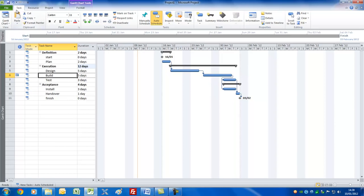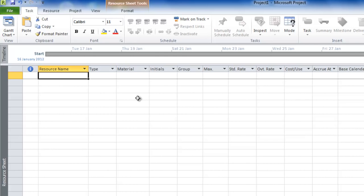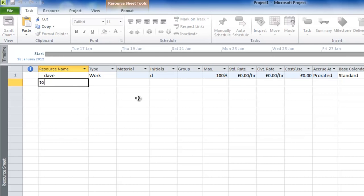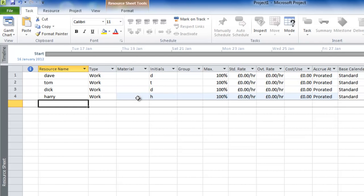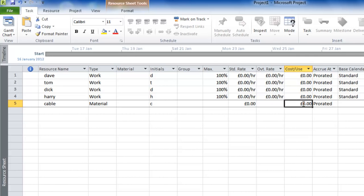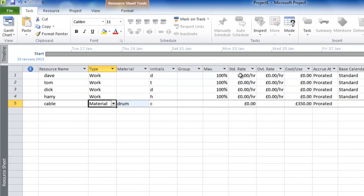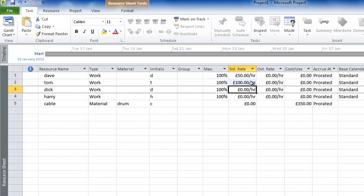Let's now set up the resource pool — for this we go to a view called the Resource Sheet. We'll enter the resources much like we did the tasks: we'll have Dave, Tom, Dick, and Harry. Just to show you can put non-human resources in, let's have Cable — imagine we need some cables — and we'll set this to Materials. Materials don't have calendars. We'll have a cost per use showing that a reel of this particular cable is £350, and we'll type 'drum' as the material name. In terms of Dave, Tom, Dick and Harry, we'll put Dave as £50 an hour and the rest as £100. That's our resources done.